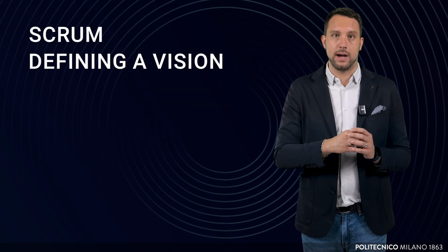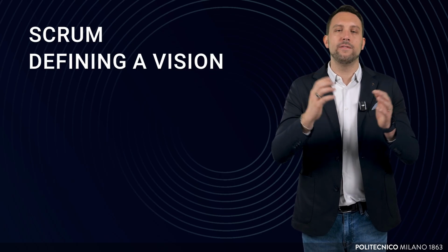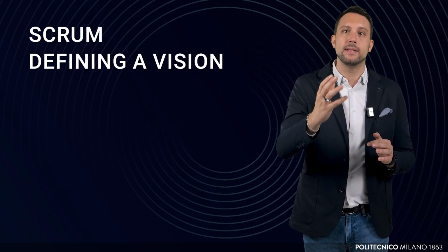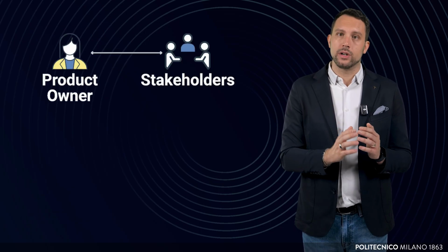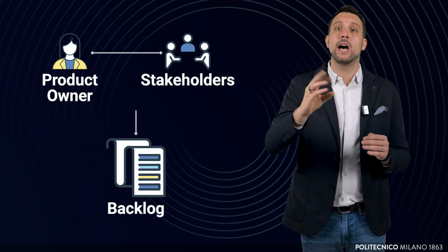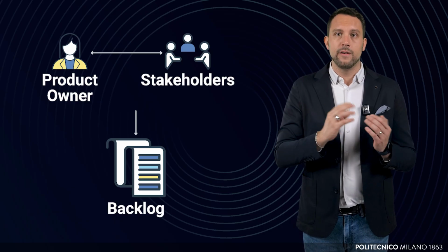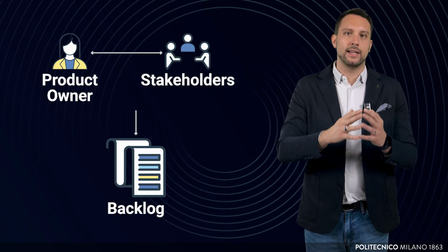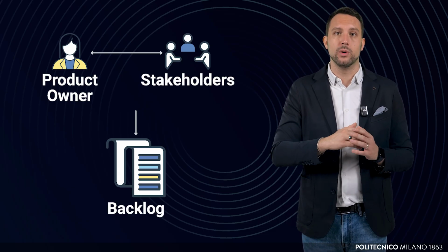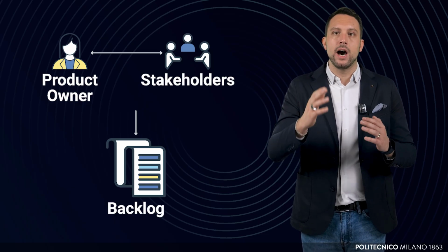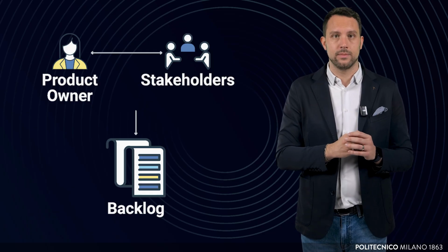The Scrum process begins by defining a vision for the MOOC platform app. Instead of specifying all features up front, the vision centers on providing a platform that enhances learning accessibility and engagement. The product owner collaborates with stakeholders to create a backlog, a prioritized list of desired features and functionalities. For example, the backlog might initially include high-priority items like user authentication, video streaming, and basic course enrollment, while lower priority items like gamification and AI recommendation are slated for later iterations.